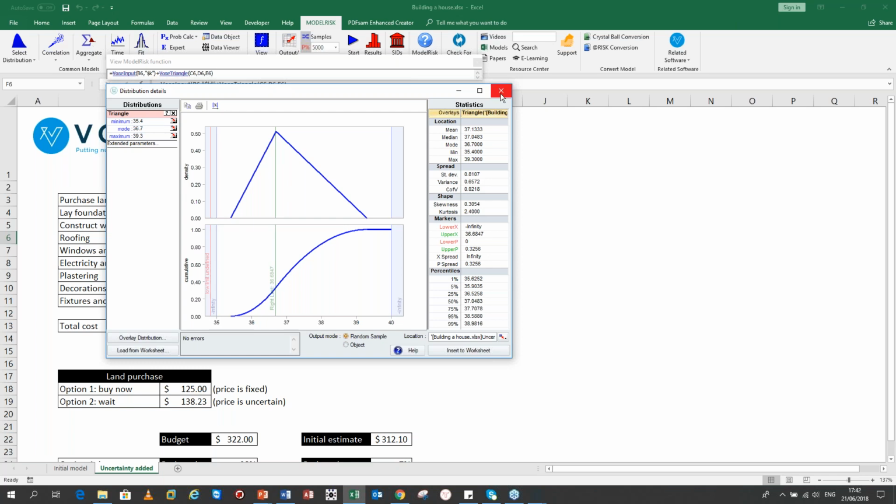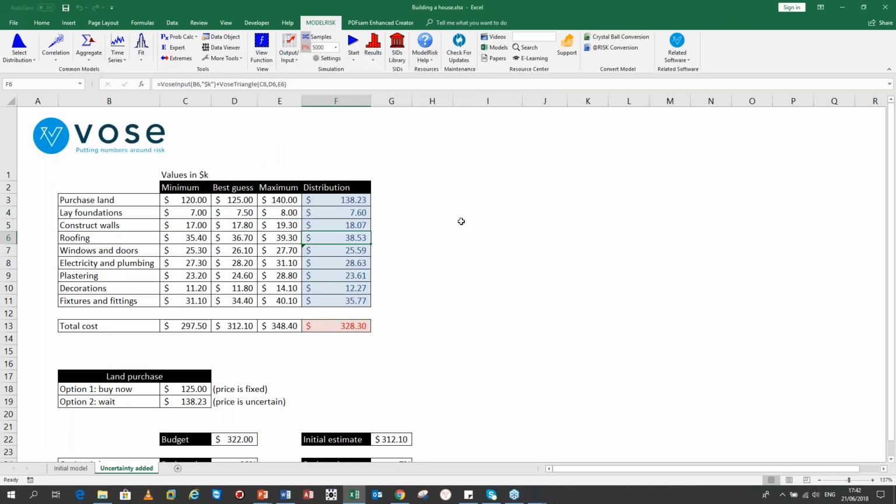And this is perfectly natural, because when things go wrong or things change, they don't generally change in our favor. Things get more costly, they take longer. It's not often that we're lucky. So when you add up the probability that there is a more than 50% chance it's going to cost you more than the best guess for each of these variables, it becomes less and less likely that in combination you're going to come up with a total cost that's less than your original best guess estimate.